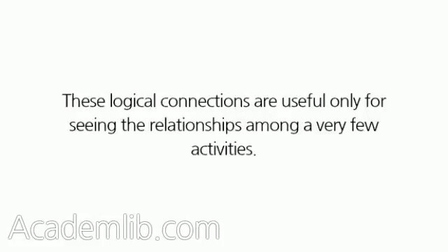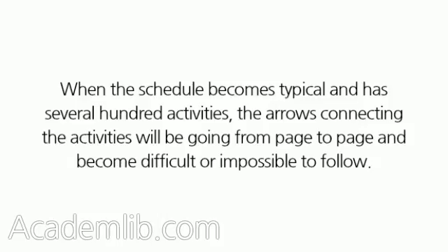These logical connections are useful only for seeing the relationships among a very few activities. When the schedule becomes typical and has several hundred activities, the arrows connecting the activities will be going from page to page and become difficult or impossible to follow.